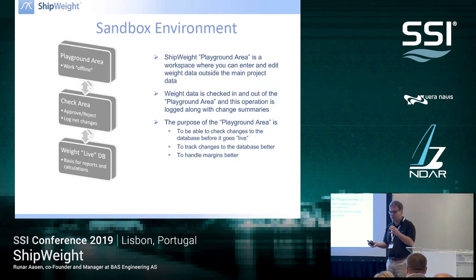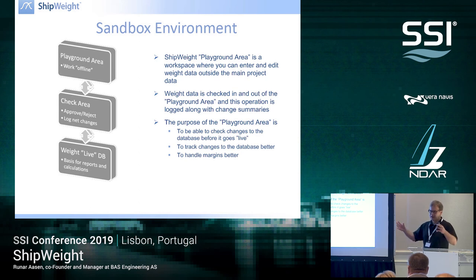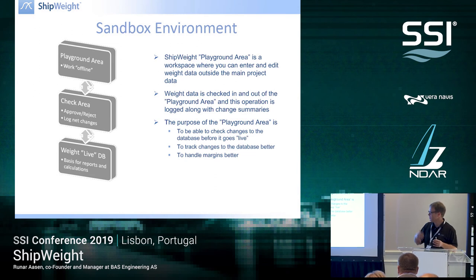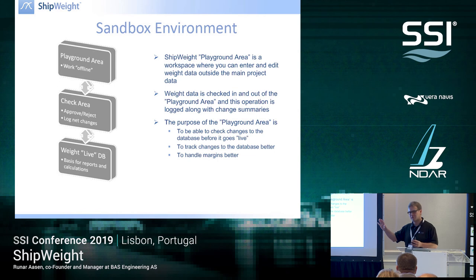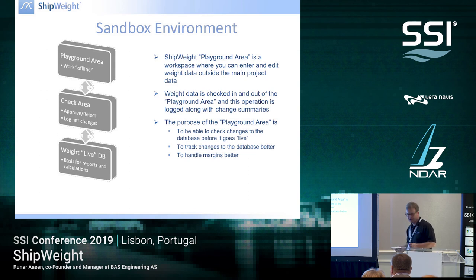We also have a pre-chamber. If you want to, you can import data into a sandbox environment — we call it a playground area. This means you can bring data in and check them in this sandbox before making it an official part of your project. You can also bring parts of your current project into the sandbox, make some changes, run what-if scenarios, and then approve or reject the change. This is also a good way of logging change orders.